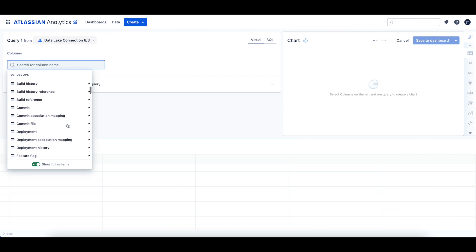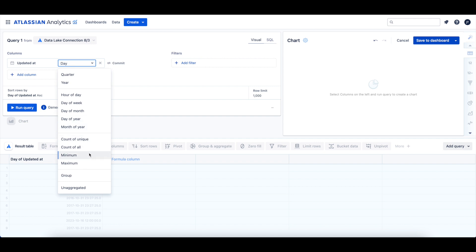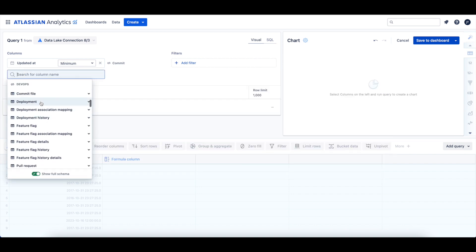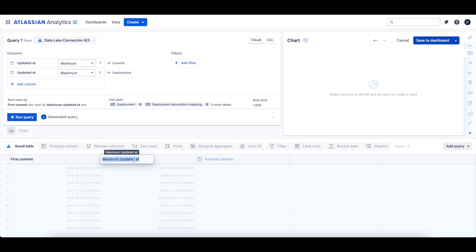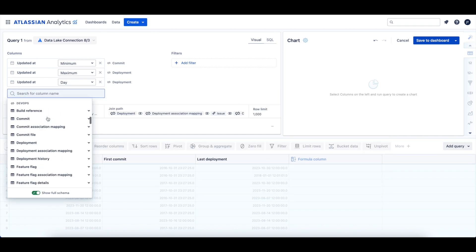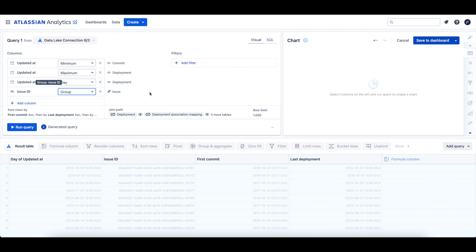For the query, let's start by adding the updated_at column from the commit table, and we'll change the grouping to use the minimum aggregation. We'll rename the column to 'first commit.' Next, let's add the updated_at column from the deployment table, change the aggregation to maximum, and rename this column 'last deployment.' Then we'll add the updated_at column from the deployment table a second time and leave it grouped by day. Finally, we can add the issue ID column from the issue table and update the aggregation to use Group. These columns will help us calculate the deployment cycle times for each issue.